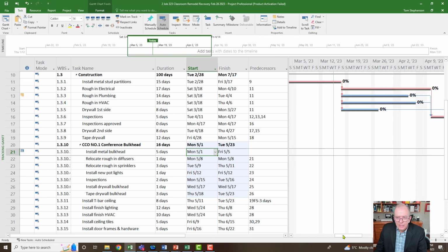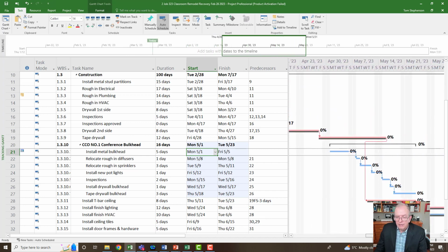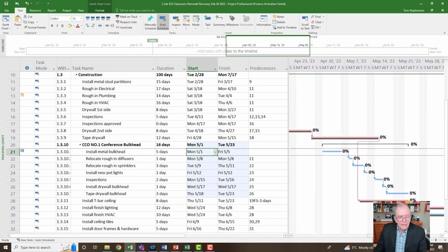a constraint, I usually like to have it where I'm about to update it, and the constraint's going to disappear anyways. Because once you update something and say it's done or it's started, the constraint goes away because it's done. There's no longer a constraint there. In this case, because it's so far ahead, I want to relate it to some other activity.